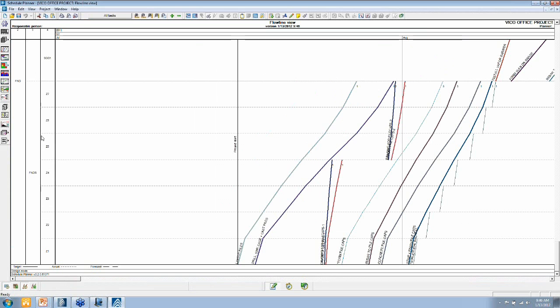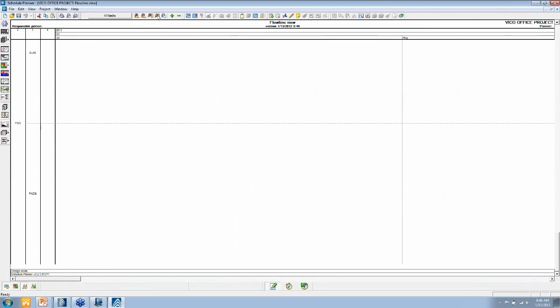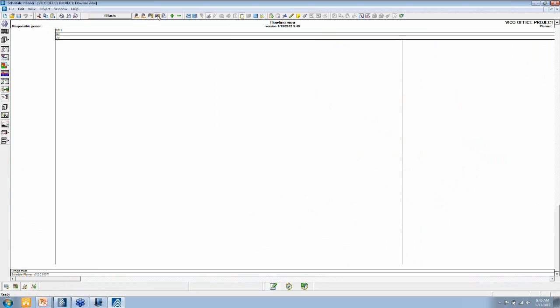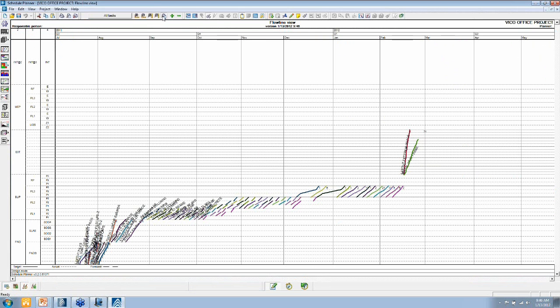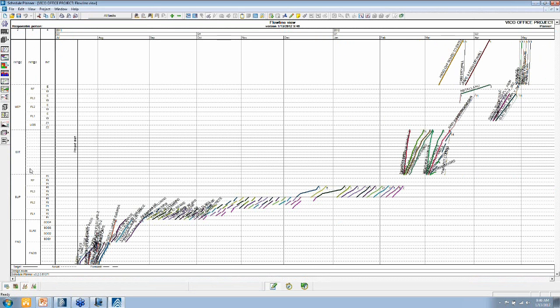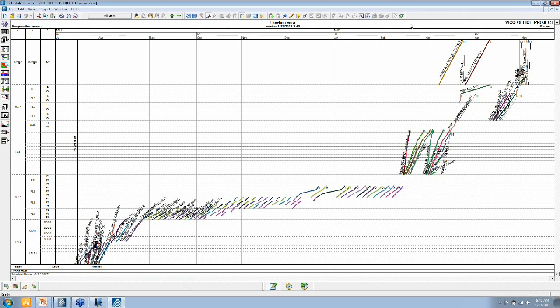You can see the locations in the project over here to the left. Let's zoom out a little bit to see the entire project. These are the tasks. This is the time scale, and each line represents a task or a crew that's being performed in a location.